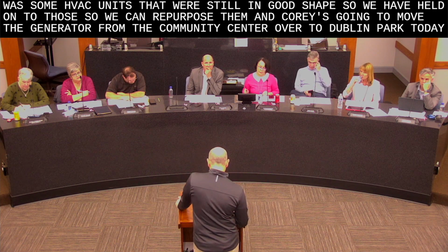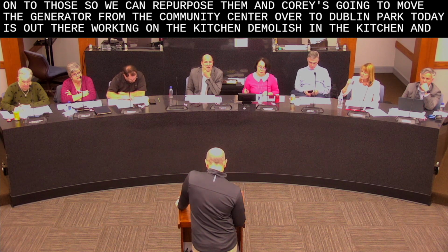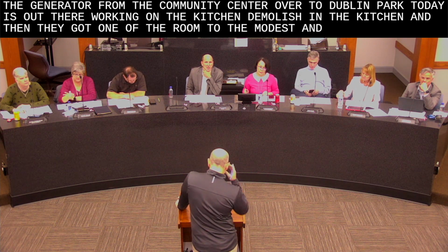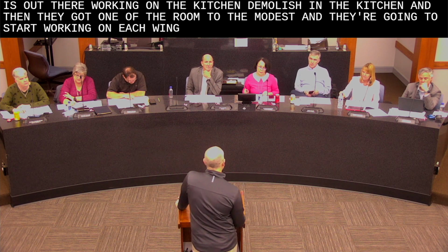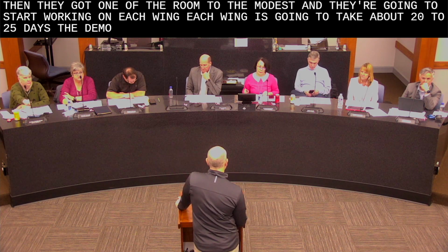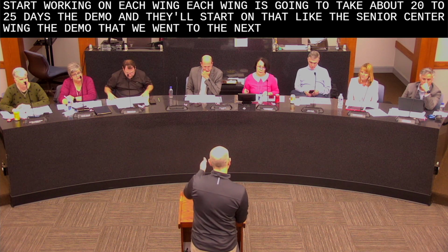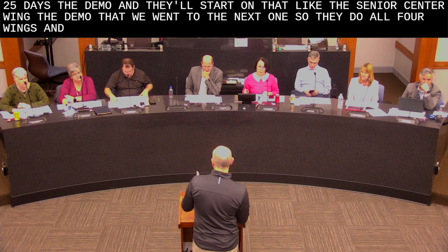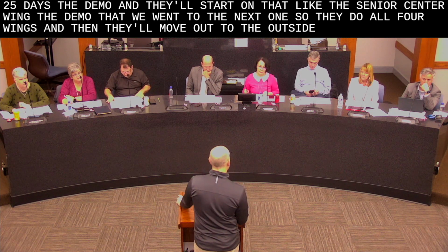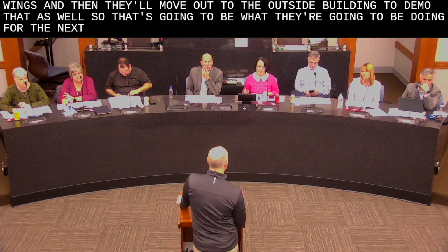Today, they're out there working on the kitchen, demolishing the kitchen. And then they've got one other room to demolish, then they're gonna start working on each wing. Each wing is gonna take about 20 to 25 days to demo. And they'll start on the senior center wing. They'll demo that, move on to the next one, so they'll do all 4 wings. And then they'll move out to the outside building to demo that as well. So that's gonna be what they're gonna be doing for the next 3 to 4 months.